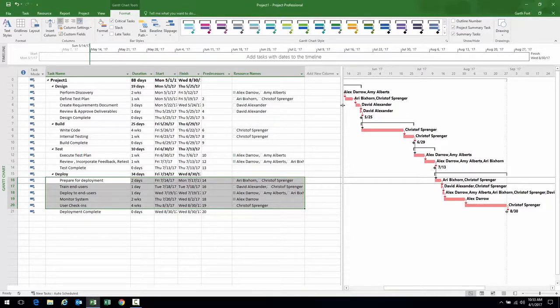You can also use it to help you incorporate lessons learned. If you constantly are missing dates, constantly coming in over budget, over hours, you'll just know that maybe we should consider revising the estimates in this template or something like that.